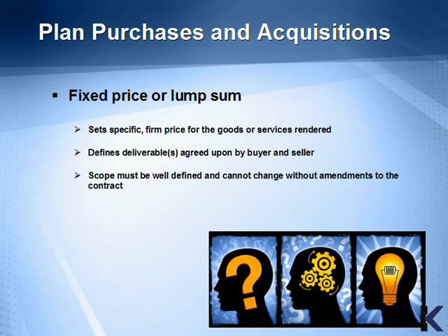Fixed price or lump sum. This type of contract sets a firm specific price for the goods or services rendered. It defines the deliverables agreed upon by buyer and seller, and the scope must be well defined and cannot change without amendments to the contract.